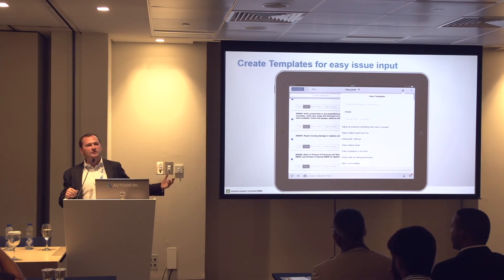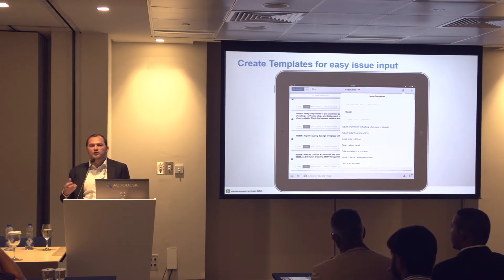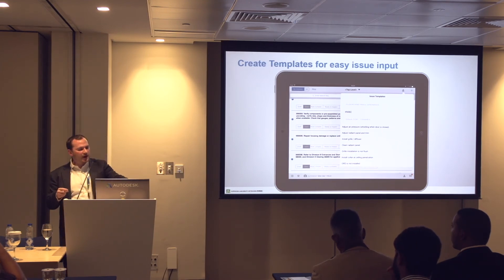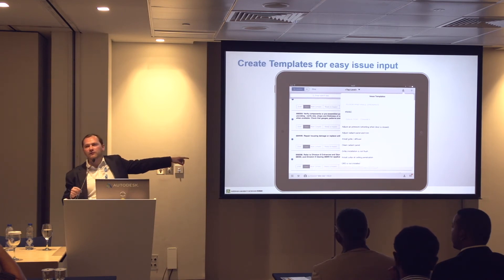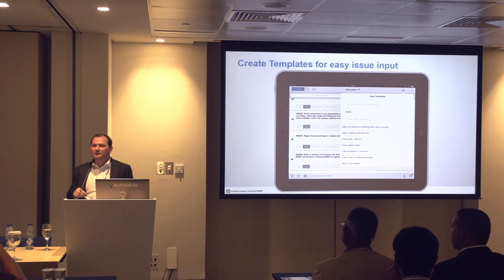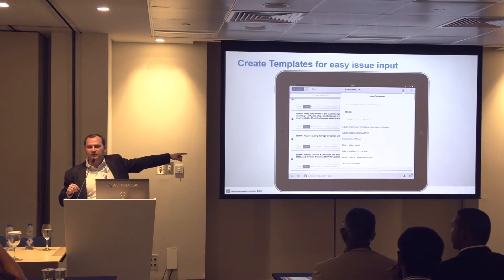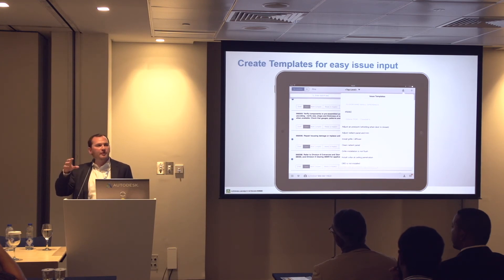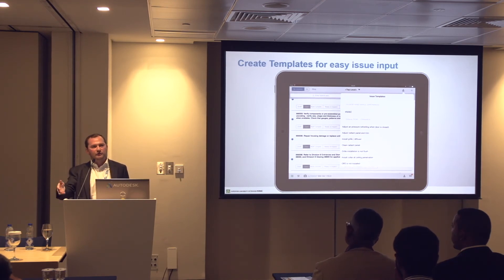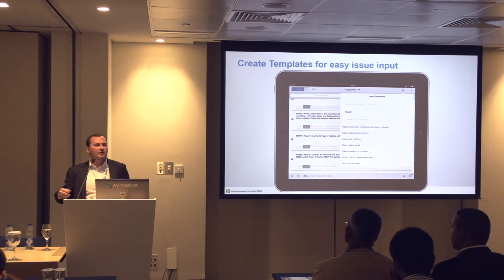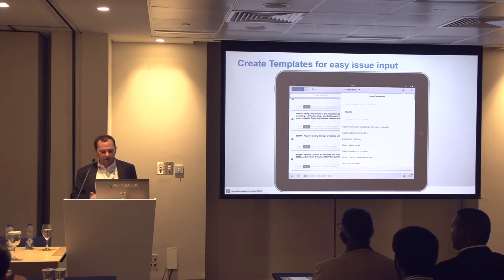We've got a thing called templates which allows you to say: here are the most common issues, the things we see time and time again. Rather than typing these out every single time, you can create templates. So every time you have an HVAC grille installation that's not flush, rather than typing for two minutes and taking a photo, you press two buttons, bring up that particular issue and take a photo to demonstrate. That's taken something which may have previously taken two minutes of capturing the issue plus two or three minutes back in the office of typing it up, and brought that down to maybe a 30-second process — speeding up the way you work.